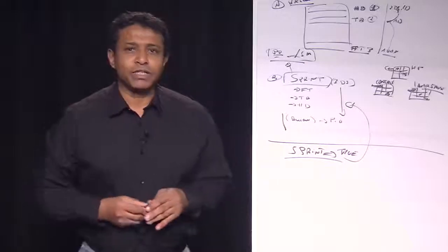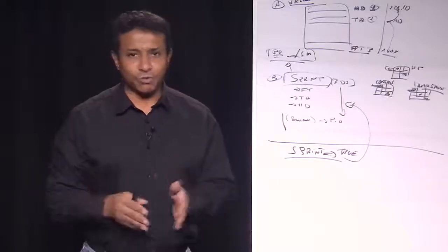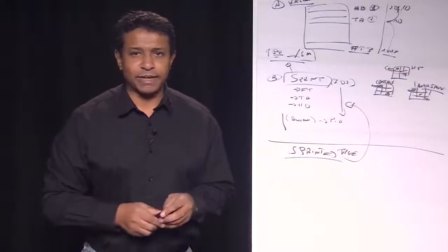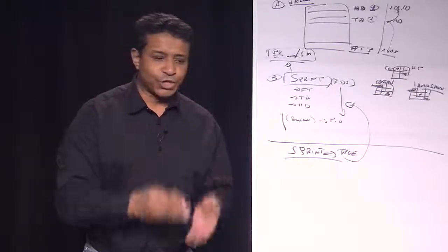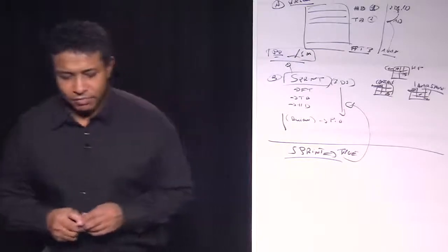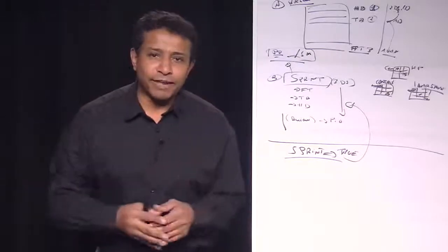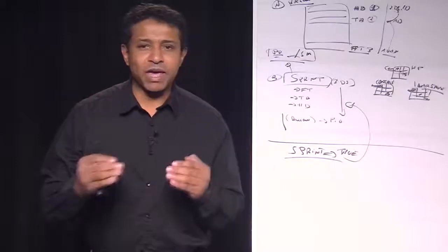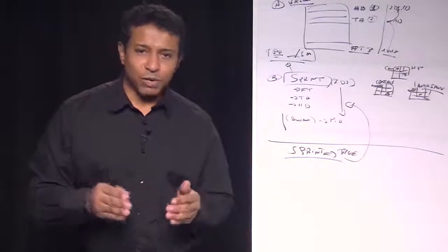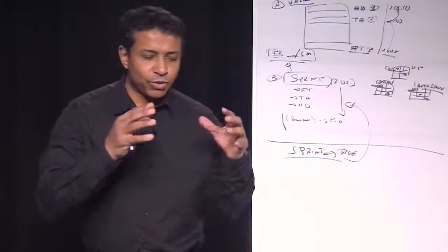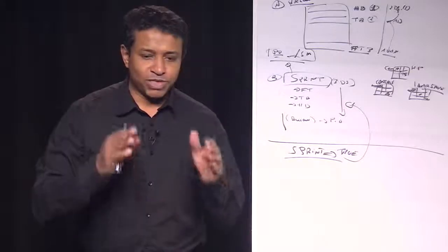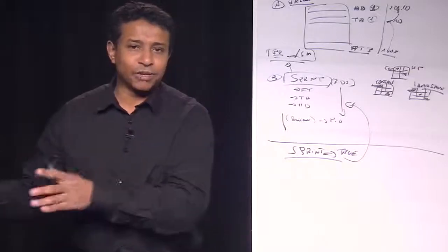The dogs are a team of developers, any kind of developers, front office, back office, and stuff like that. They can be 2 to 10. Why 10? Because above 10, it won't be easy to manage all the people during the sprint. So if we have a huge project, we separate different dog teams.